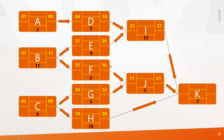Calculate the early finish for I and J: they are 37 and 21. Now the fourth and final level: K is waiting for I, J, and H to complete. Pick the longest duration, which is 37, and add 1, making 38 the early start of K. The early finish of K becomes 40. Since K is the last activity, the project will finish on day 40. This method of calculating early start and early finish is called the forward pass.